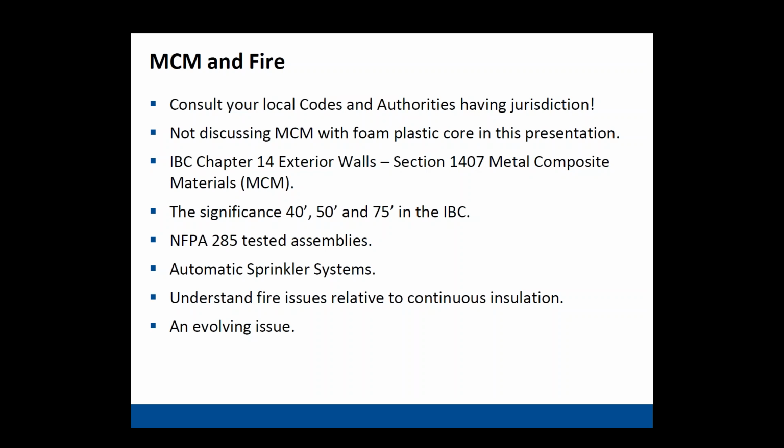So I would agree with Eric that it's important to call the fabricators in, because we know what makes this product expensive and affordable, and can help direct the architect or the designer to get it for the best value. Whereas the material manufacturer knows what their sheets cost per square foot selling to a fabricator, and their cost of sheet goods is probably only 20% of your final installed cost. So the fabricator is coordinating everything beyond a skid of material hitting his dock to be put on his machines.